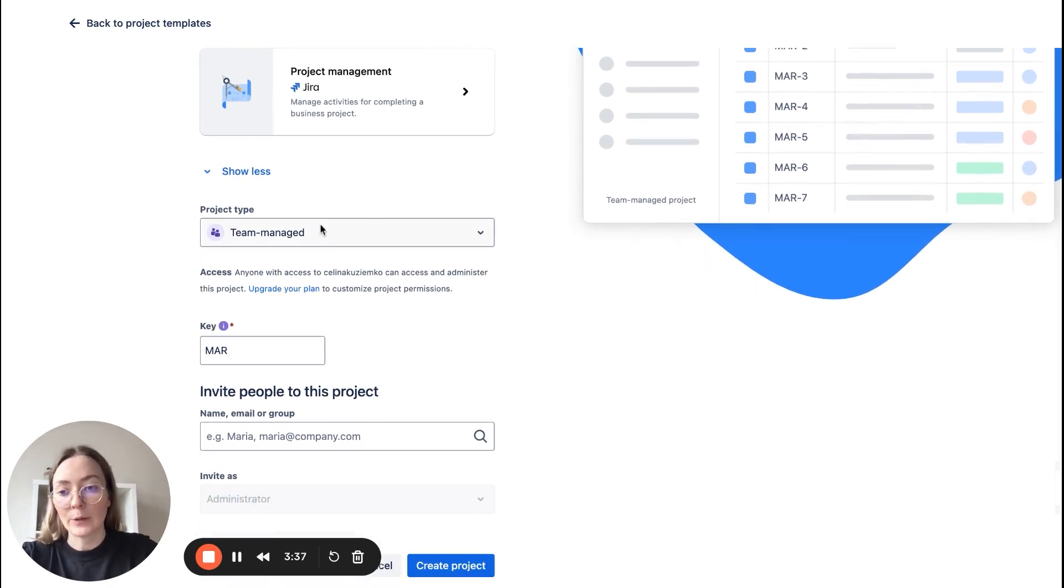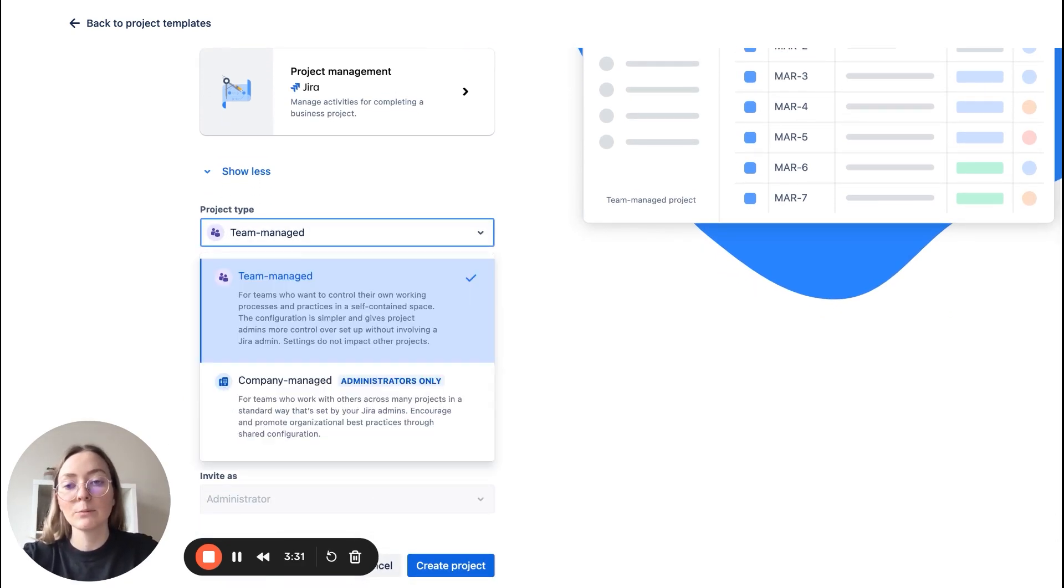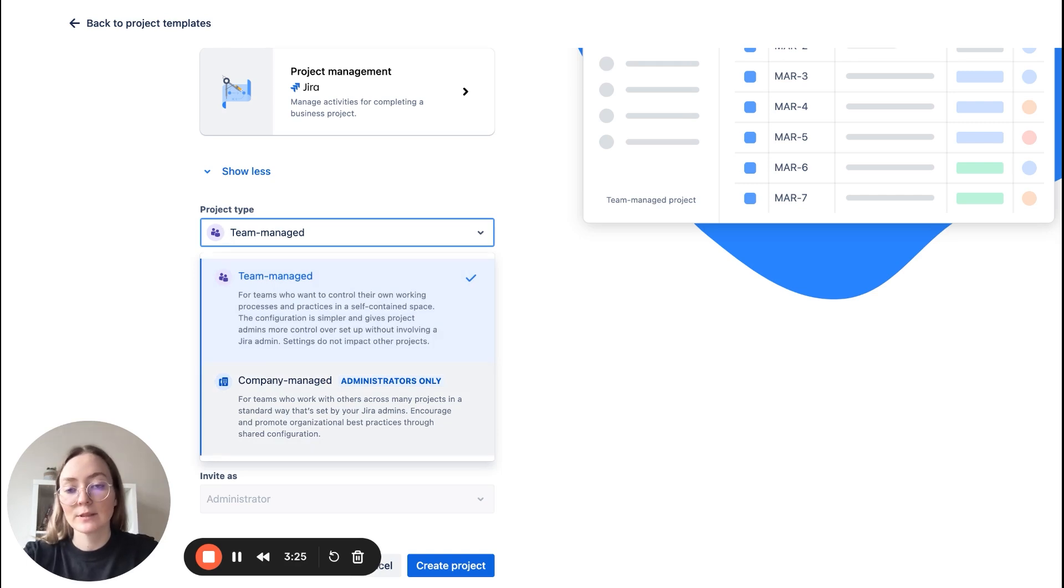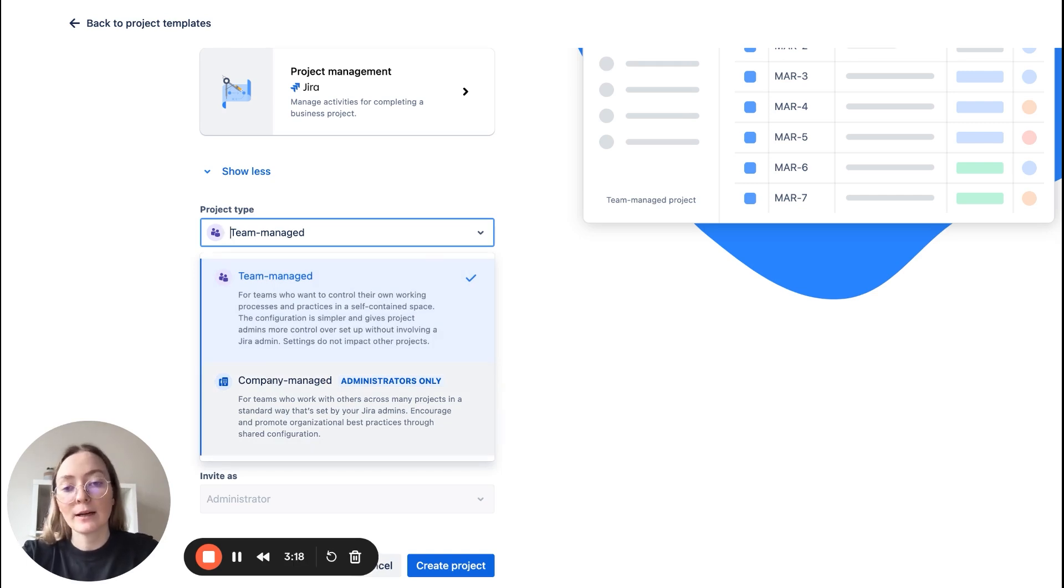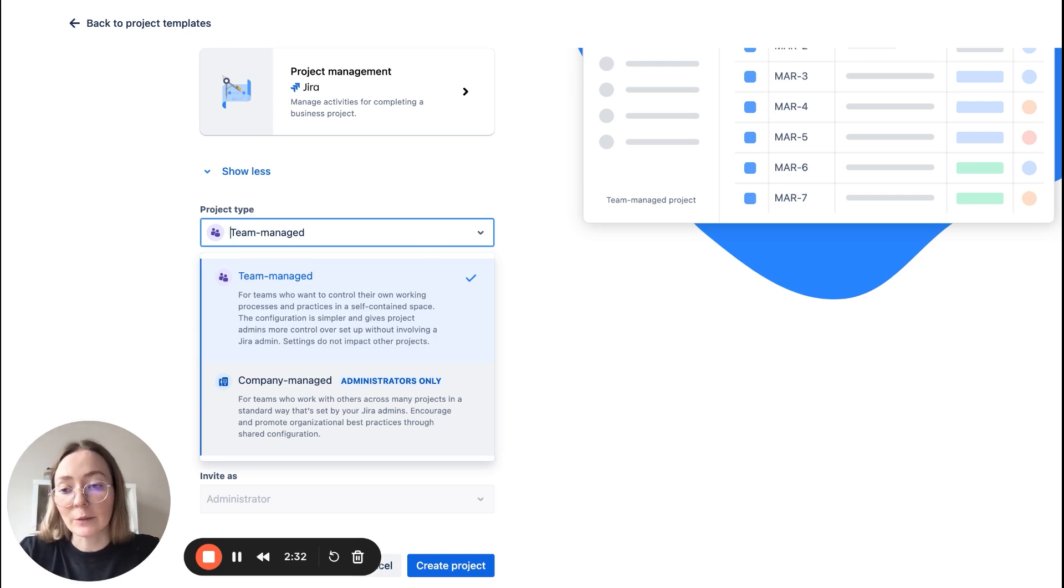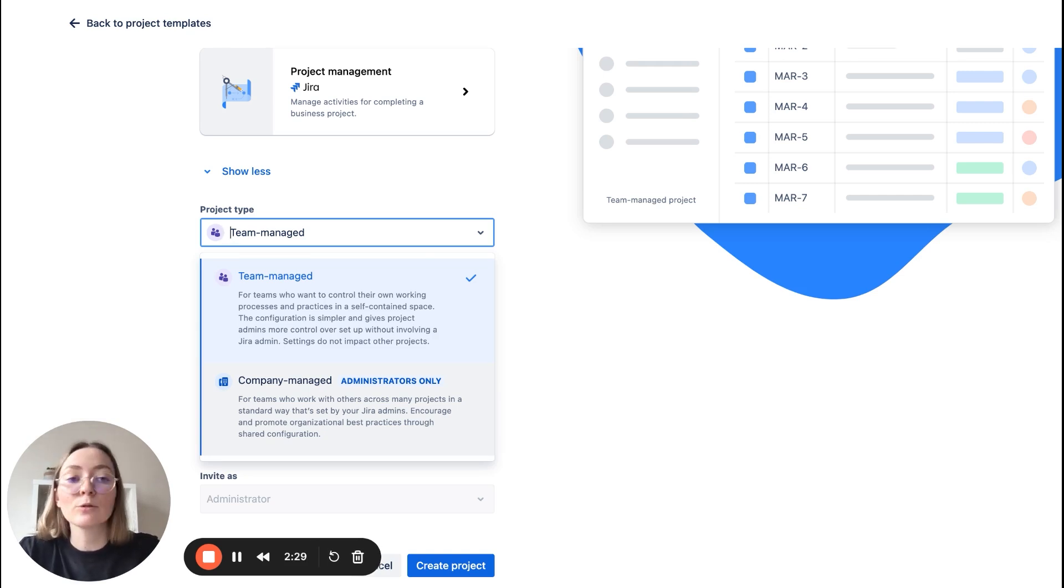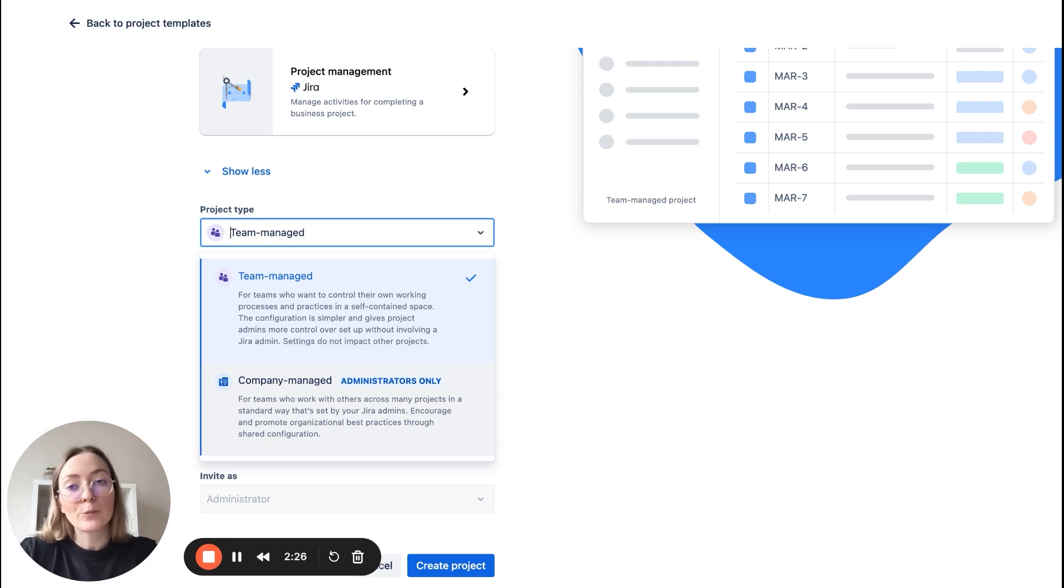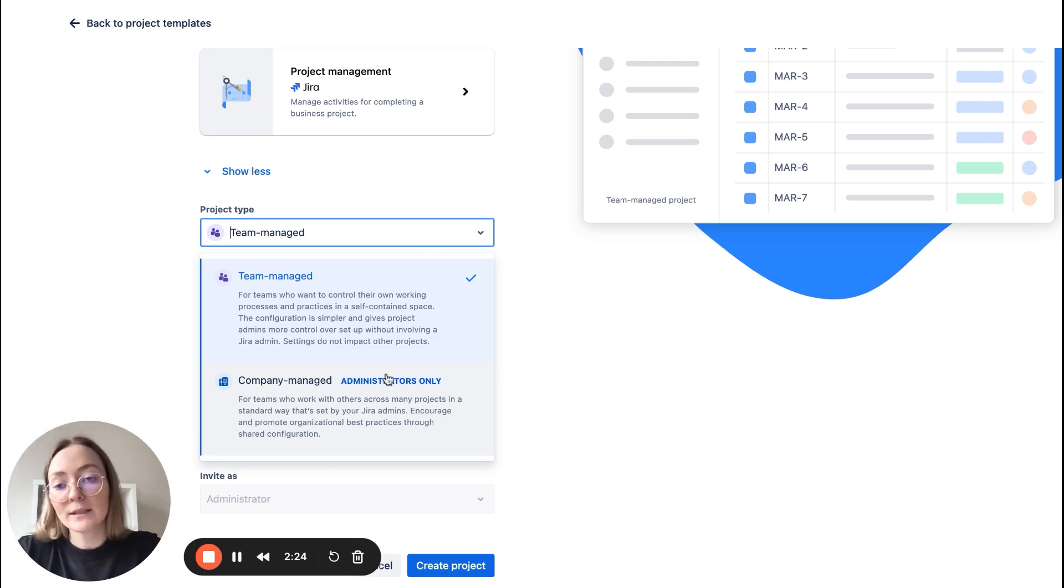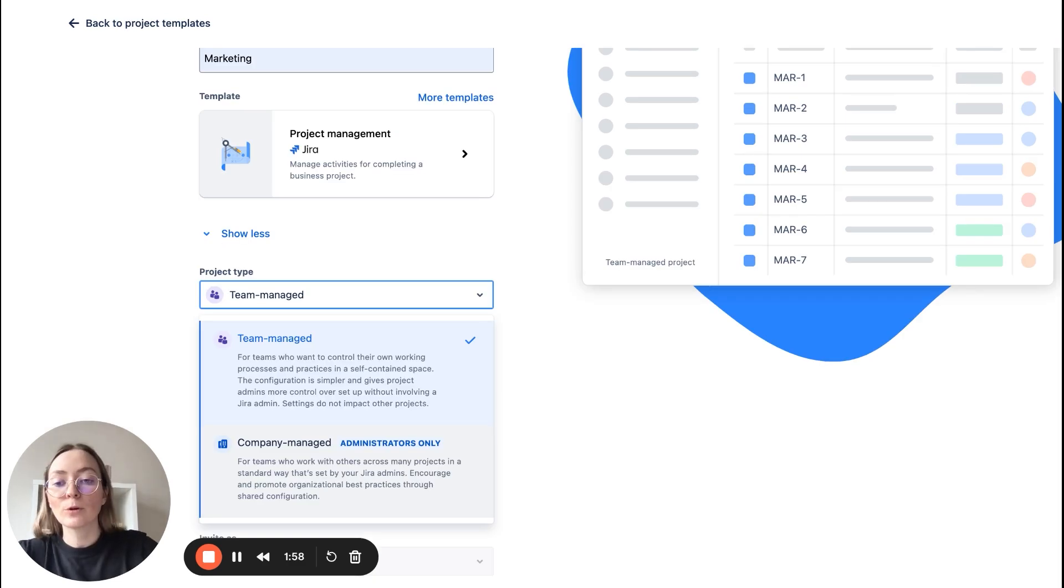And here you have project type: you can choose between team managed and company managed. But as you can see, company managed project can be created only by admins. But here's the key: if this project is only for your team and you don't need to integrate it with other projects in your company, team managed is perfectly fine.